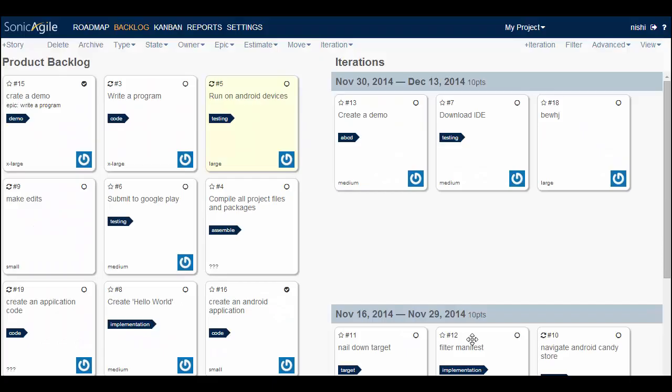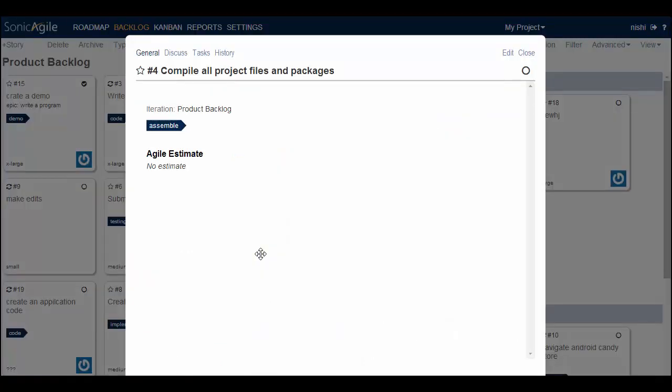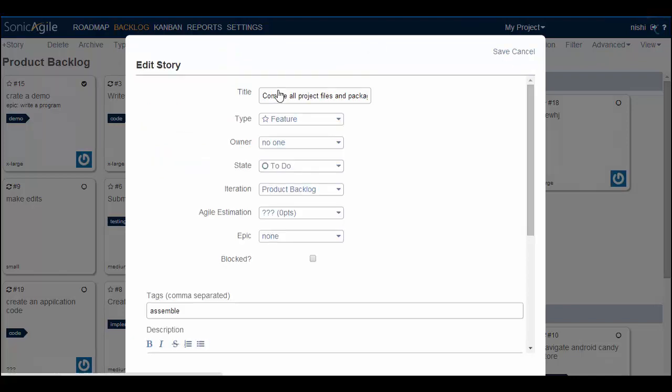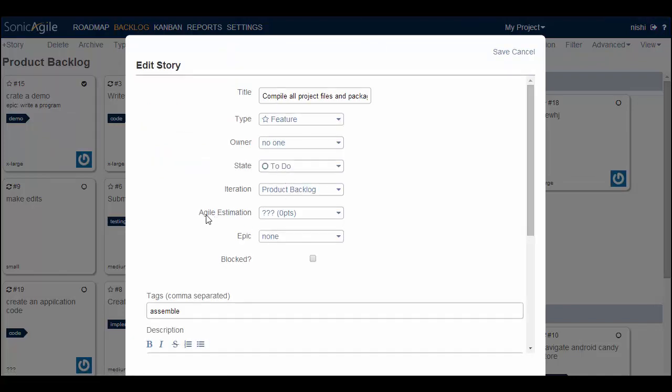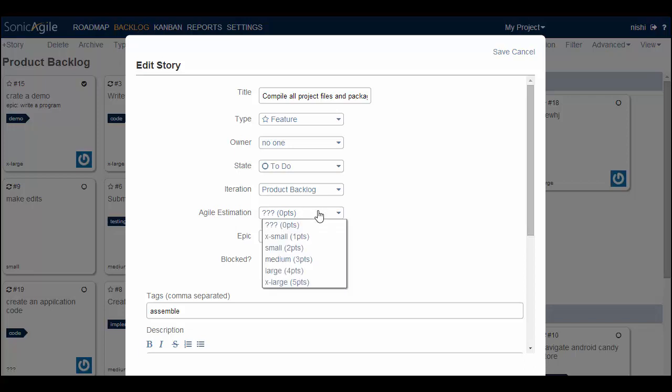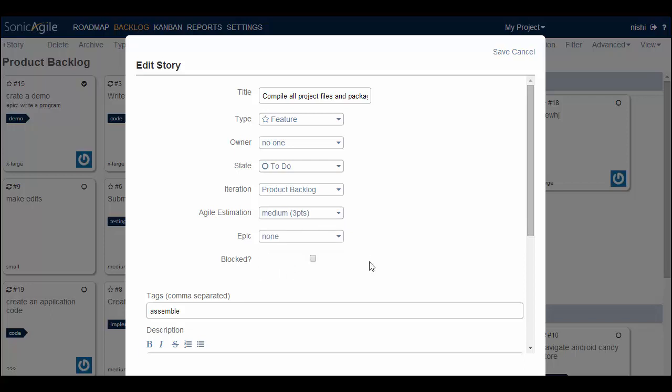After you enable Agile Estimation, you can assign an estimate to any story in your backlog. For example, if you want to estimate the time for this story then you need to double click on it and you can see this page. Go to edit and this is how you will see Agile Estimation option here. You can select according to the story as it is medium or large or anything and then you need to save it.